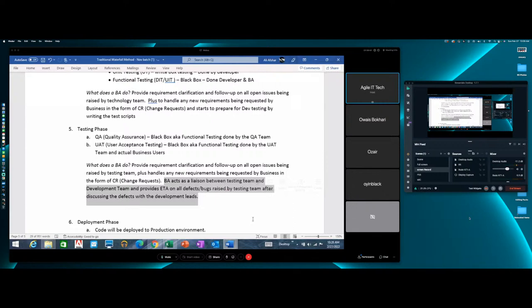Now let's say, remember, laundry is now hanging where? Outside. In the front yard. Right? Because these reports, the QA report and UAT report, are going to the entire project team, correct? So let's say QA just started, and after 1 week of testing, on their report, they're seeing an initial pass percentage of 65%. Okay? And after reporting a 65% pass rate, how much is fail? 35.